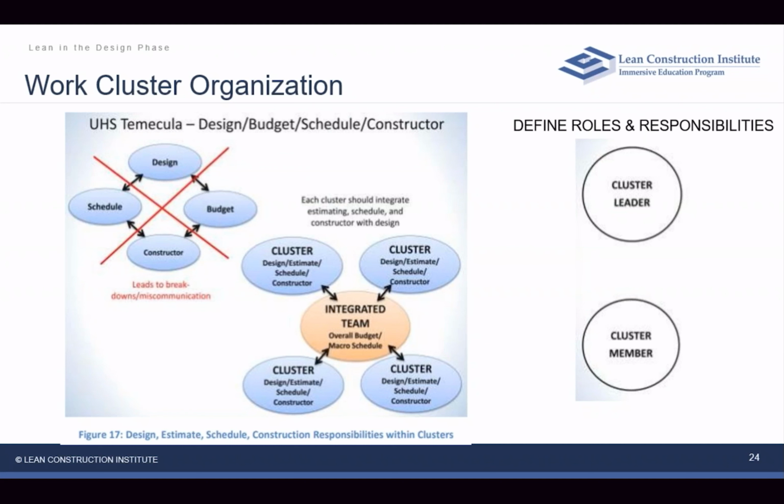So when we have things like big room, or we have these effective meetings going on, this is an opportunity for us to actually create cluster groups that become more cross-functional. So the cluster group integrating an estimator, the project manager who's managing schedule, the designers. And when we can get those cluster groups to focus on a particular topic, so when we are doing a big room and maybe doing some last planner work or a lean construction type initiative, we can really focus on topics and then create those cluster groups.